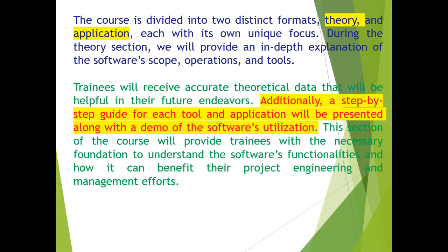Then when you compare the plan versus actual, you'll find the variance. Variance can be cost variance. Variance can be time variance. Variance can be resource variance. You may have X production planned, and Y production, productivity, you are getting. How do you overcome that? Then based upon that, how do you update the schedule?